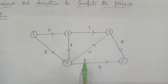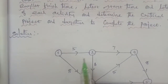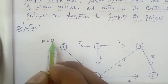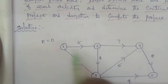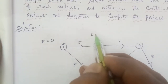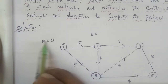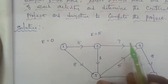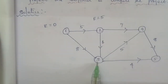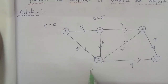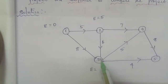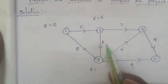Now we calculate the earliest start time. The symbol for earliest start time is E. The initial starting value is 0, so E is equal to 0 at node 1. For node 1 to 2: the E value at node 1 is 0, plus duration 5, gives E equal to 5 at node 2. For node 1 to 3: E value is 0 plus duration 8.